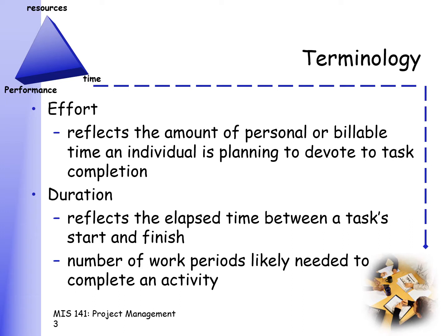Now, whenever we talk about effort, effort reflects the amount of personnel or billable time an individual is planning to devote to task completion. Take note, it is the plan of an individual. It's coming from the individual himself, and they themselves are going to be able to tell you whether they're going to give you 100% of their time or just 50% of their time. The definition so far of effort here is that they are going to take 8 hours a day.